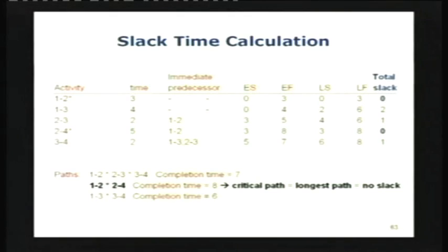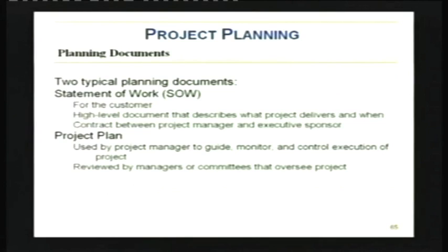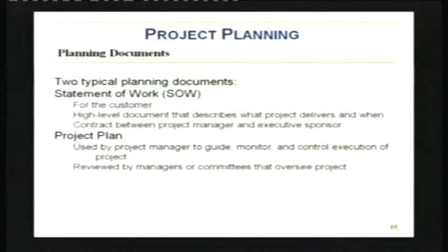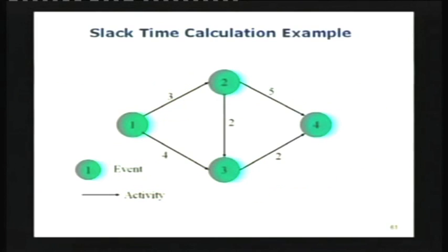And let's see you've done that. Then you go back and try to see what the total task is going to be. You'll identify the critical path. So let's make sure we show the critical path. It's from 1 to 2 to 4. That's the critical path. The other activities have slack. What is the utility of understanding where the slacks are? What is the usefulness? I can swing resources. Very, very good. I can swing resources, and I also know now which activities must be resourced completely in order not to delay the project.